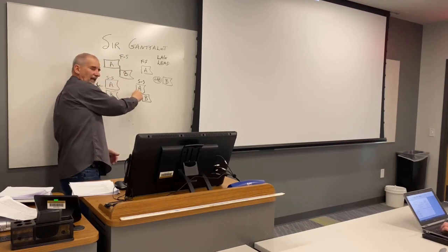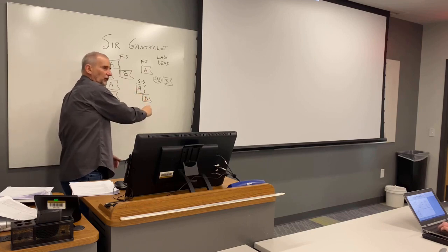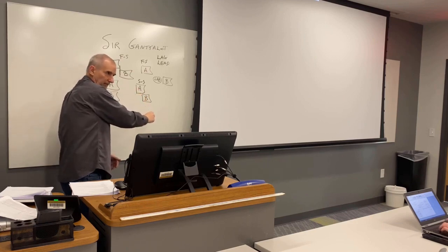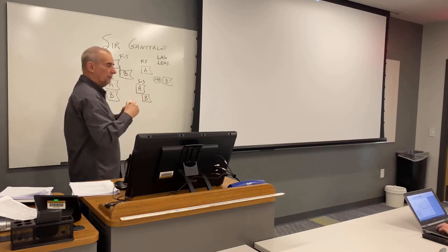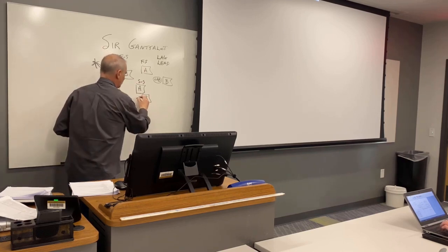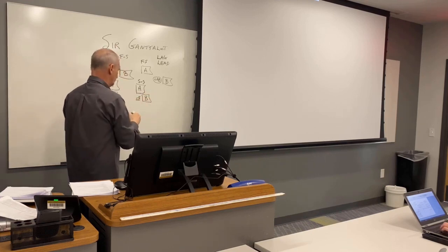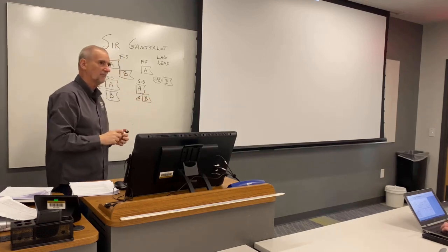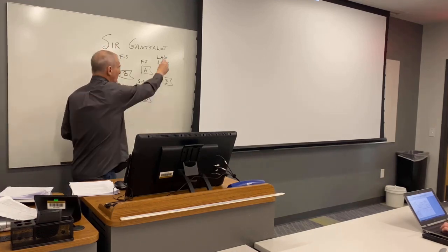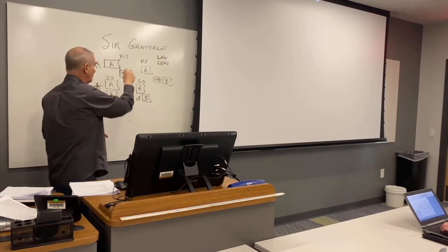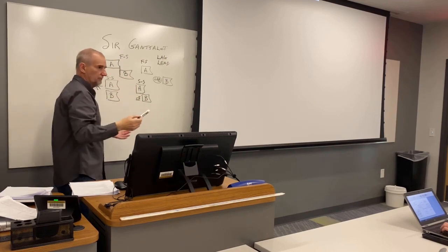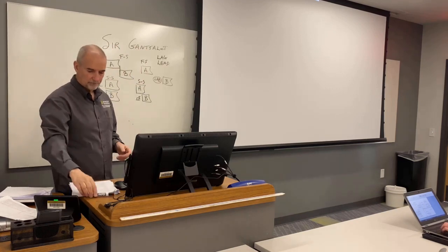This one, I start sanding at 8, I don't go to the store till noon. You with me? So it's a lead, but it's 0.5, half a day. You understand? So these leads and lags allow you to fine tune the relationships between these two. That's pretty cool, because that's what happens in the real world.